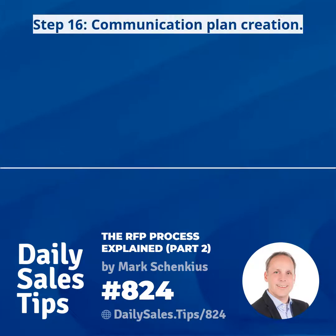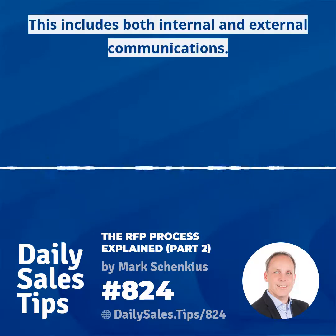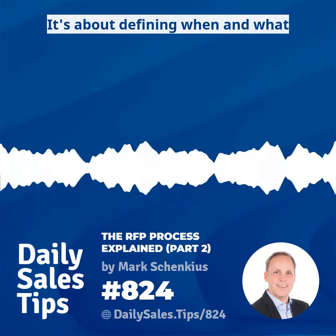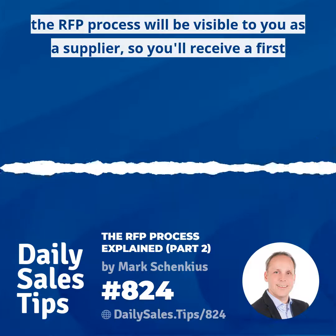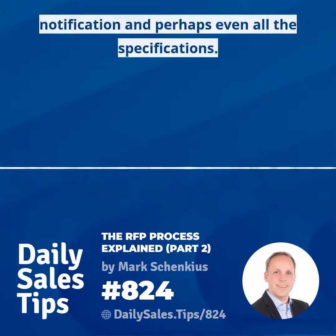Step 16. Communication plan creation. The last step in the process is a communication plan. This includes both internal and external communications. It's about defining when and what information you are going to share with your stakeholders. After this step, the RFP process will be visible to you as a supplier, since you'll receive a first notification and perhaps even all the specifications.